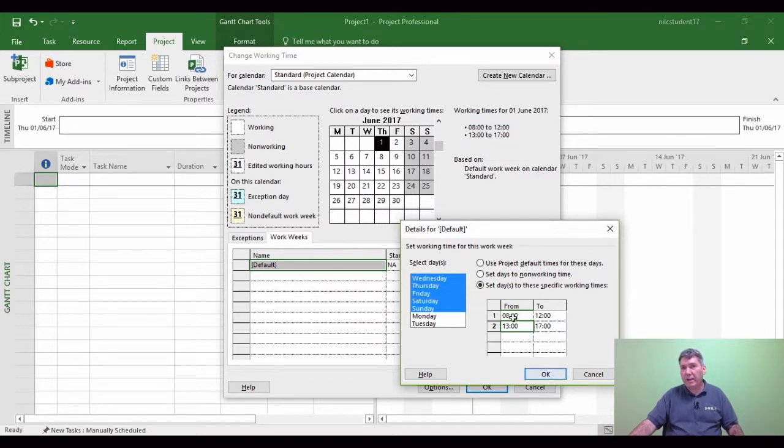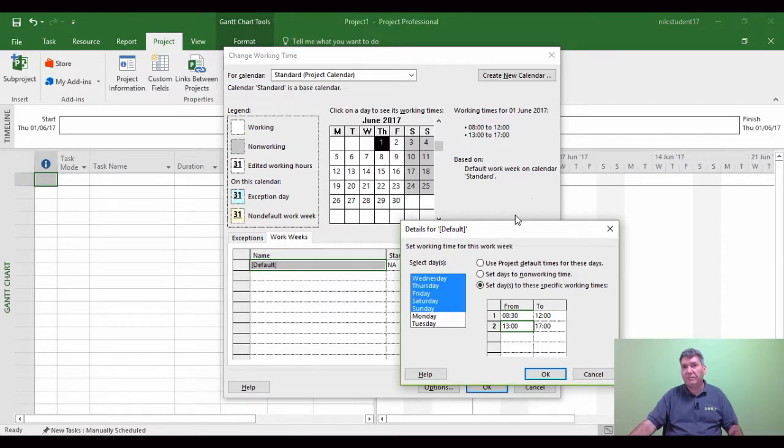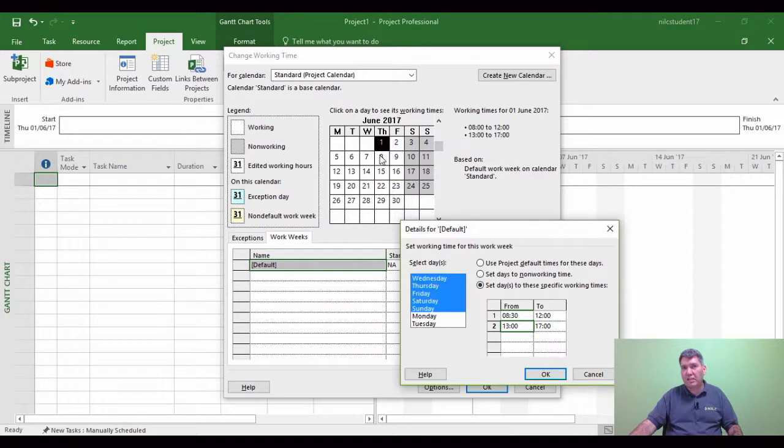Now when I click OK, you'll see 8.30 to 12 at the top. So instead of 8, it's 8.30 to 12, and the 1 to 5 will remain the same. But what you'll notice is in the calendar, this white and gray area is going to change. And we'll see what happens as soon as I click OK.